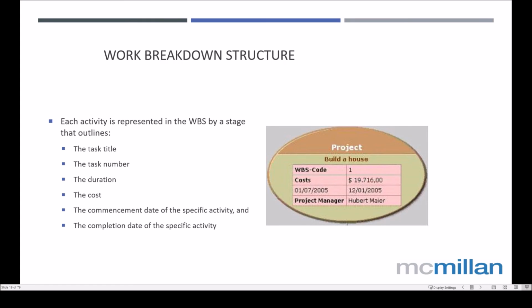And just to sort of break it down, every work breakdown structure is modified to be fit for purpose. From a traditional theoretical perspective, these are the components that you'll find in a work breakdown structure. You'll have a code, and you'll see the code when I show you a Gantt chart later. You'll see that the code is really important in terms of being able to link information on a Gantt chart to the work breakdown structure, or any other documentation where we're taking info from one and putting it in the other. The code becomes important to help us to connect the dots.